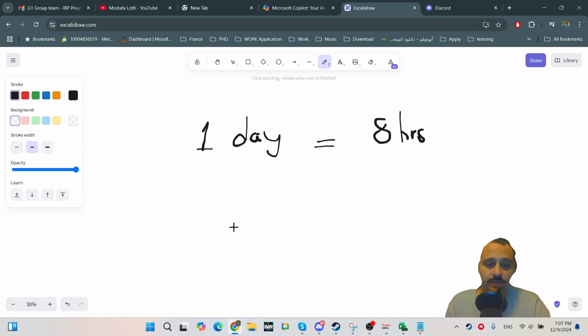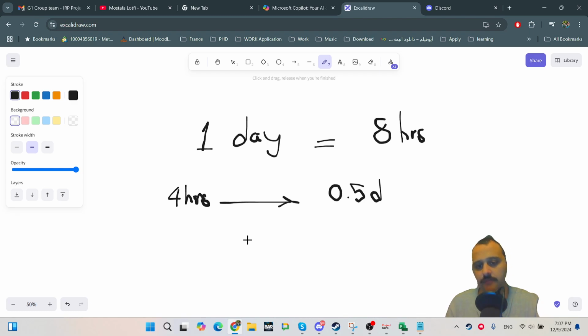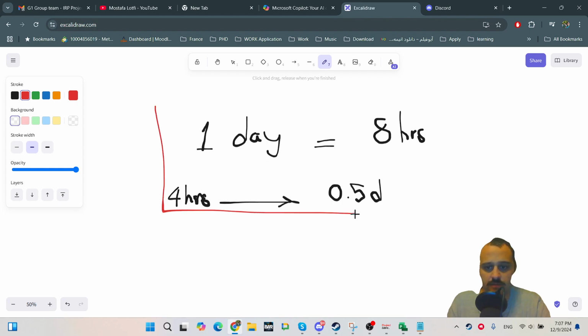So for example, if you put 4 hours, ProjectLibre converted it to half day. Okay, I hope this is clear, right?